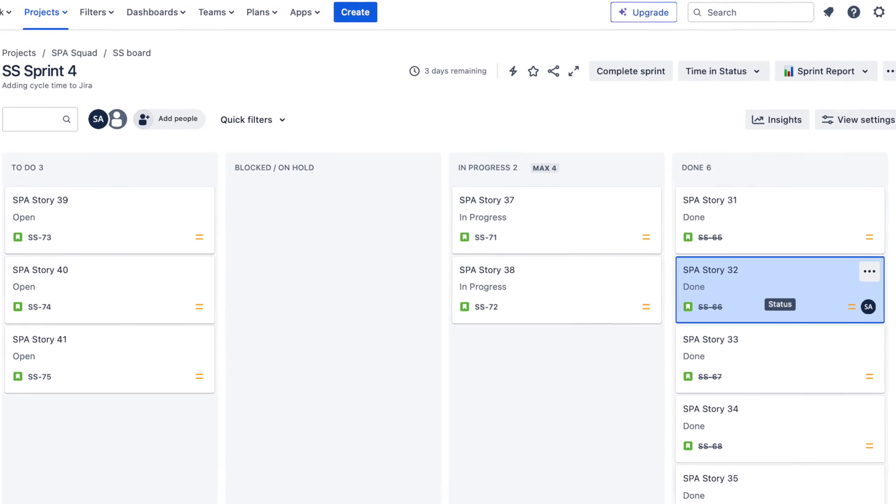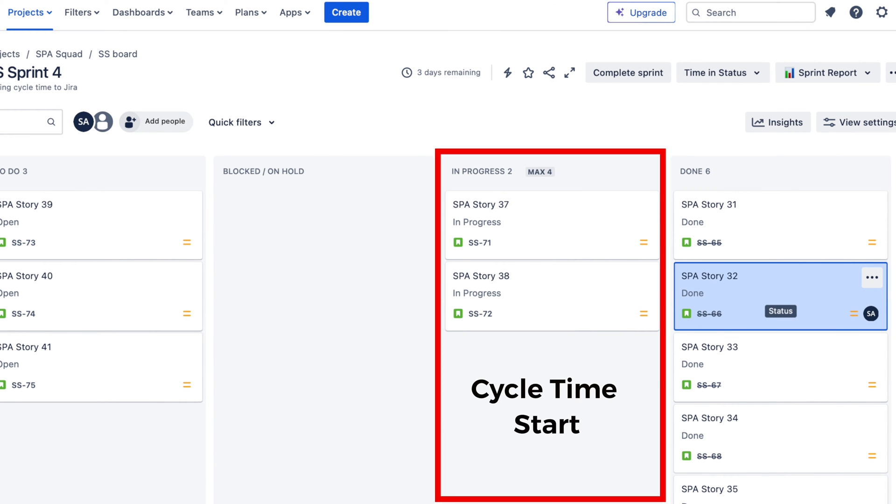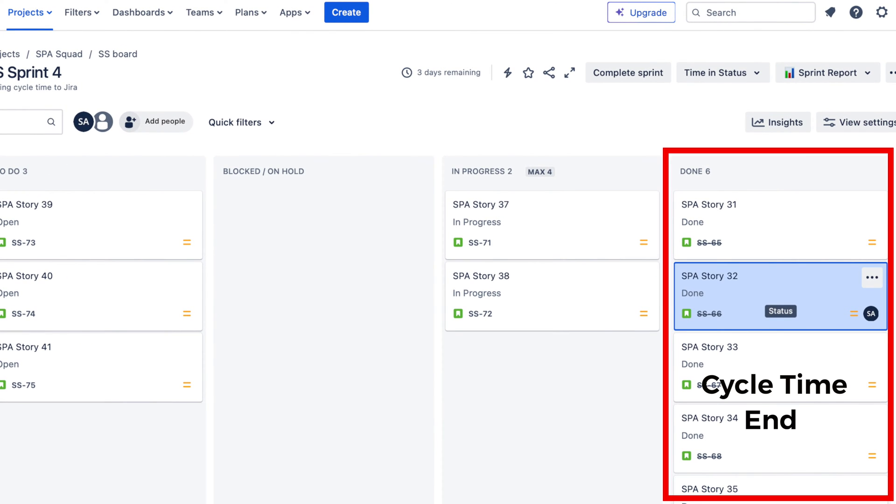The first thing you're going to need to do is create three custom fields for the Jira project you're working in. These three fields are going to store: firstly, the date for when your story enters In Progress, which is the start of our cycle time; secondly, the date when our story enters Done, which is the end of our cycle time; and thirdly, the actual cycle time of our story, which is the difference between the two dates plus one day. This plus one day ensures we capture every part of the day, and also means that if a story completes inside one day our cycle time won't be zero.